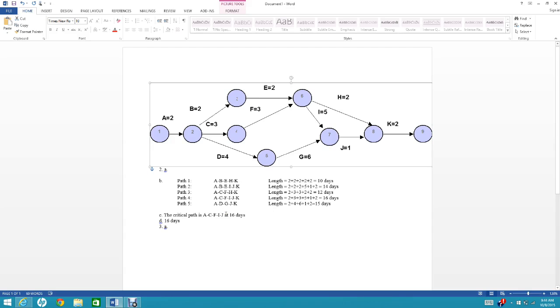The critical path predicts the total project duration. It is the series of activities that determines the earliest completion date for the project. Therefore, it is the longest path through the network diagram. Remember this: the critical path for a project is a series of activities that determines the earliest completion date for the project. Therefore, it is the longest path through a diagram. If any activity on the critical path slips, the whole project will slip unless the project manager takes corrective action.